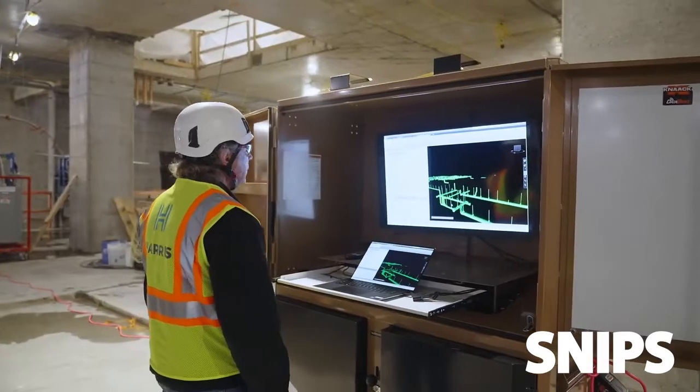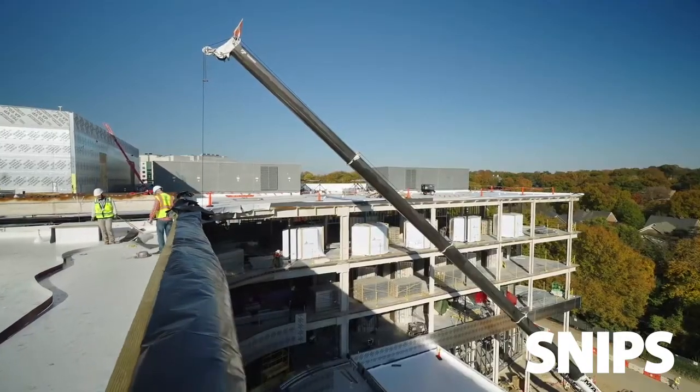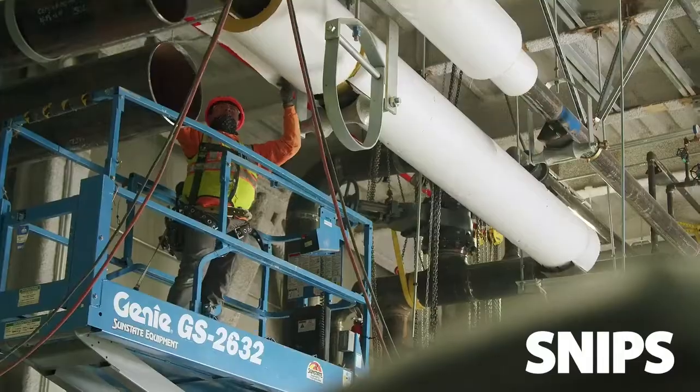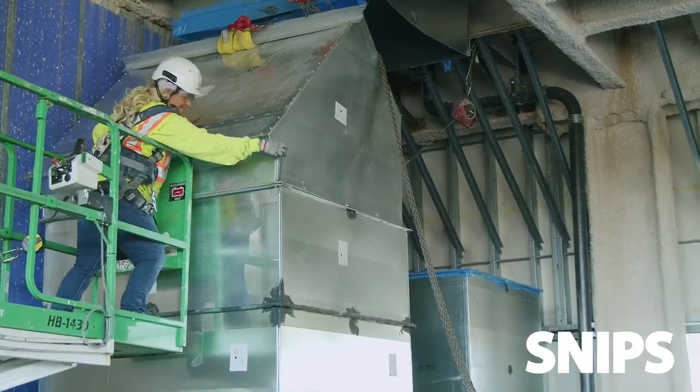What Harris does is they actually bring in foremen and superintendents who have a lot of experience in the field to help them take apart the drawing in the office and go through constructability, taking things into account like service down the road, what can we fit in the building, what's the most efficient use of a skid or a pipe rack. We take that and sometimes redesign the job and get approval from the engineer and draw that out.